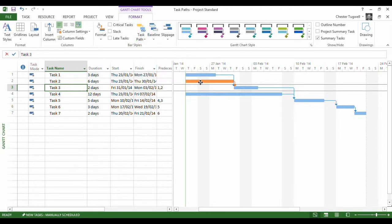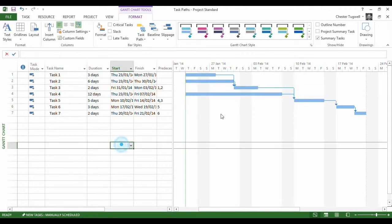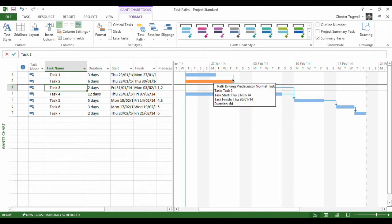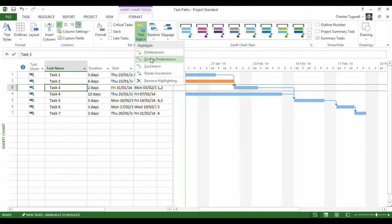Why is that? Well, because of the lag between the finish date of this task and the start date of the task that I've selected. This isn't actually driving the start date of my selected task but this is. This task is. Right, so that explains the difference between these two highlighting options.